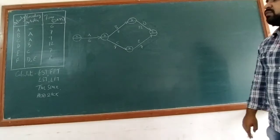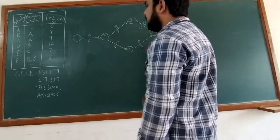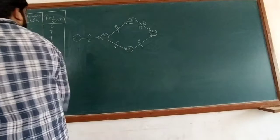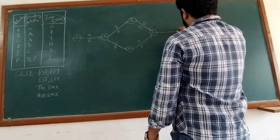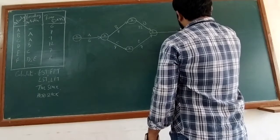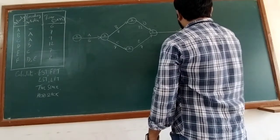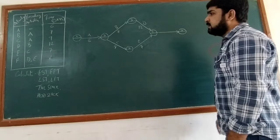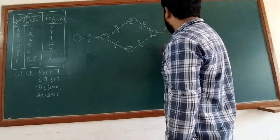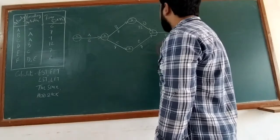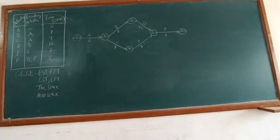We number the merge node as 5. The last activity is activity F, which has its ending node numbered 6. Activity F requires 8 days to complete.